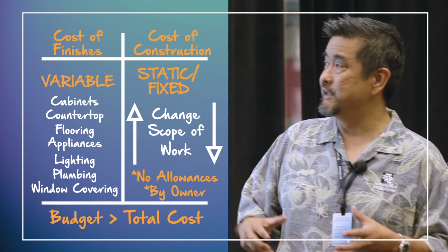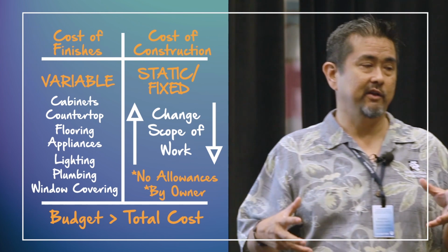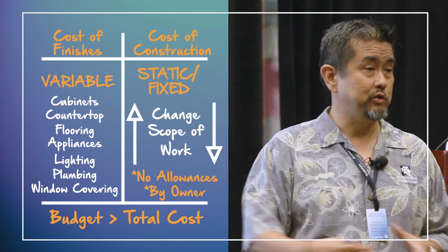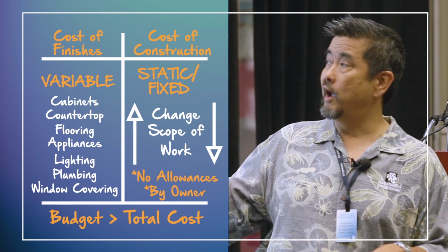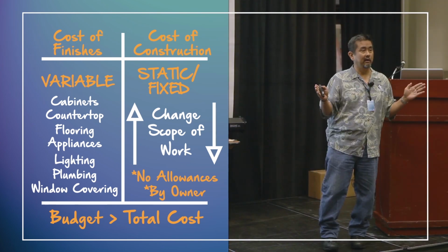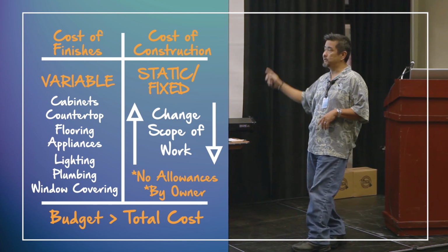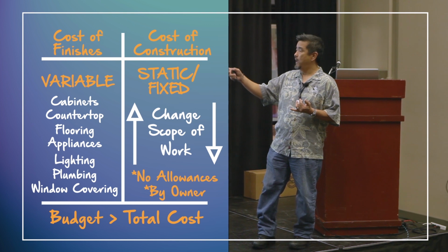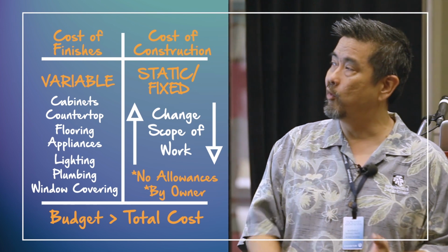Now, bundling. And this is a worksheet about bundling, right? So you're going to have contractors out there that will come over in your project and they'll end up saying things like, hey, you know what, I can give you an all-inclusive price, which is good because you get kind of an idea of what it is. But if you want to save money, I'm going to say you want to be able to split the two things apart. You want to talk to contractors about contracting, and on the other side, you're going to tell the contractor, I don't want any allowances for material in your bid, and everything on the left-hand side is going to be by owner. So carpets by owner or flooring by owner, cabinets by owner, meaning I'm going to pick what I choose and put it in.